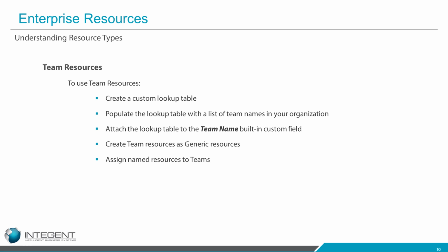All right, the drawback to using teams is that since it is a team, if you are on that team, when you open up a timesheet or a task page, you don't automatically see team assignments loaded to a task page or a timesheet. They would not be there. So you do have to wrap some additional training around that to let your resources know that if they're a part of a team, they're going to have to go and add the team task to their timesheet or their task page as they update that task progress.